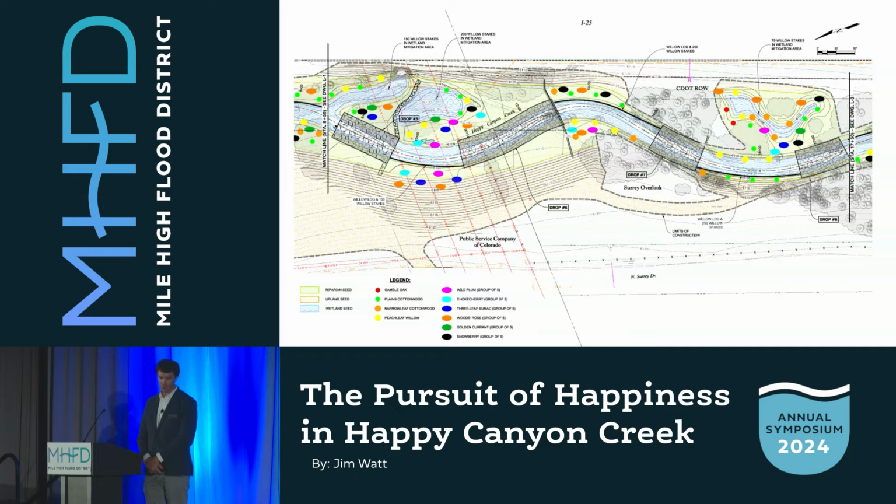installation of plant material. Our particular project was approaching the construction phase at the latter part of the summer and fall of 2023, and we realized that some of our materials weren't going to be successful if we planted them then. So being flexible and putting that in this past spring is eventually going to save us money and time and headaches over the long run. Keeping that long-term perspective is important. The re-veg phase for this project is going to be the next 3 to 5 years.